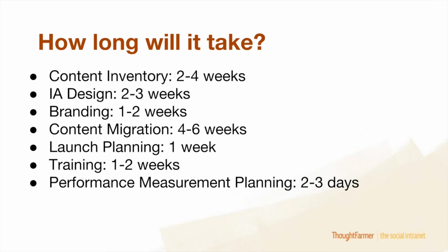Yeah, no, that's a good point. Sometimes what you can do is prioritize your content. If you have a tight timeline, and you want to launch, say, your intranet on May 1st, you can look at that content inventory, select the pieces of content that are most essential or crucial for your staff, and prioritize those for migration. That way you have key content already populated on the intranet when you launch, and then you can continue the content migration after launch date at a slower pace, without that looming launch date to target.